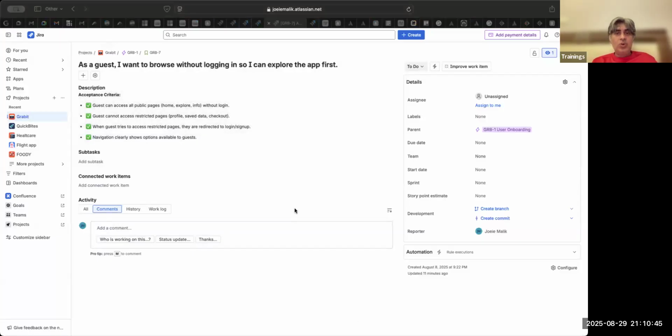So now the technical team gets into the picture. The technical team says, boss, what are the different things we have to do in this story? So until the acceptance criteria is finalized, there is an interaction between the PO, devs, and QAs. Once that is finished, that's over. You are clear with the scope of the story. Acceptance criteria is finalized. Now, the team will do tasking of the story.